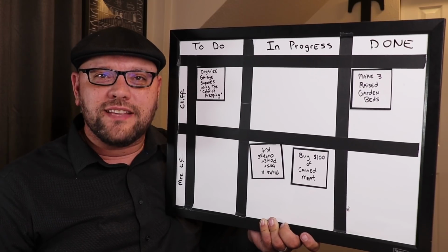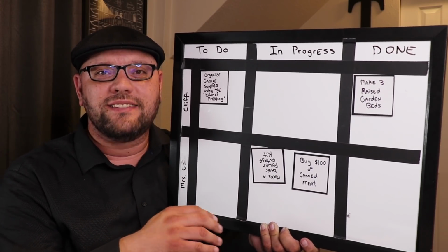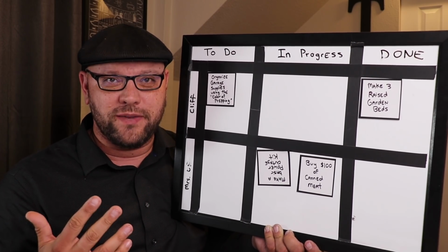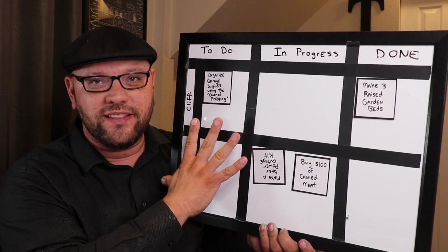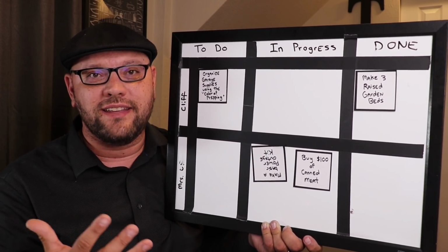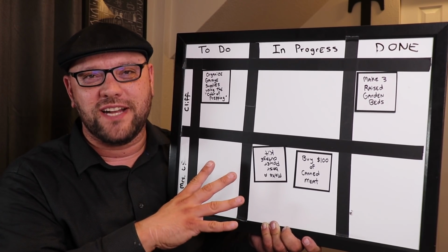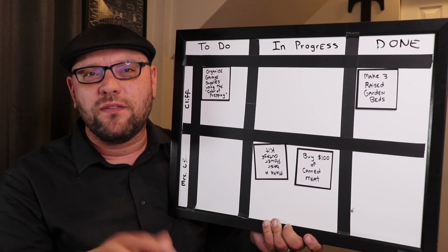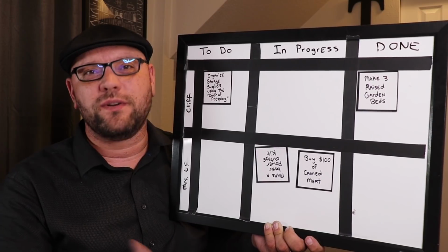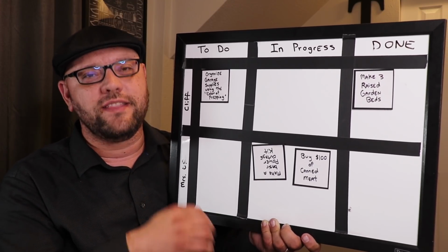So a couple other concepts in regards to agile methodologies, which relates to having a Scrum board, is having what's called a sprint planning meeting and a sprint retrospective meeting. So before even starting this, you have to figure out what tasks you want to work on. So that would be planned in something called a sprint planning meeting. You don't have to be so official when you're just doing prepping projects or video projects, but an overall, maybe meeting on Sunday, hey, what do you want to do for this week for our preps? Or what do you want to do this month for our prepping projects? And hey, I think we should make the raised bed garden, or I think we should do this.